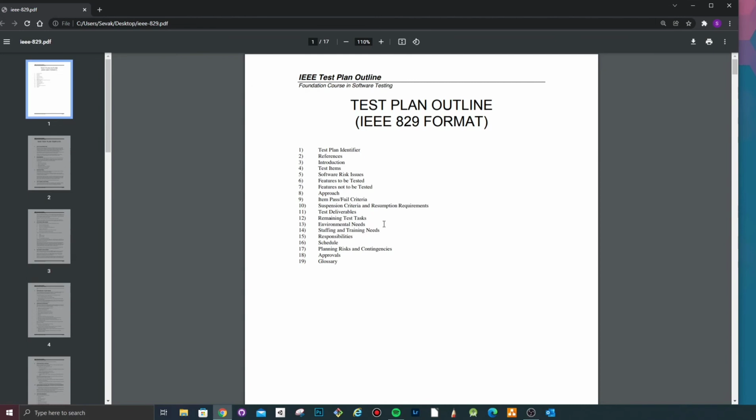But if you really want to be structured and defended against the ups and downs of miscommunications, of people expecting something in the beginning and then telling you that they expected something else at the end, then it's quite key to put something like this together in a formal way and have it approved by the project manager, and reviewed by the key stakeholders, so that everyone knows what we're on about when we're starting testing.